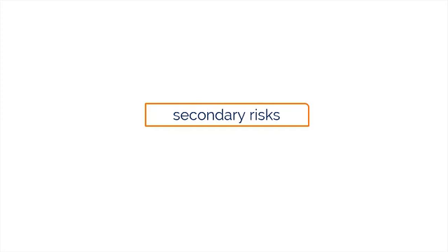Secondary risk is a new risk that arises as a direct outcome of implementing a risk response. Basically, if you plan and respond to a risk that you have identified in your risk register, and it results in a completely new risk, for which you may also plan a response for, it is a secondary risk. In other words, a second or new risk arises.